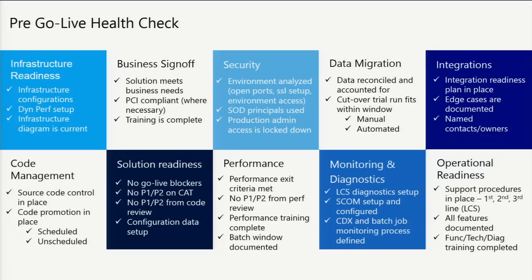And then you also have a way of saying, okay, from the users, can you live with this for the next week? Because that's when we have the next drop. You're able to set expectations clearly about what's going to happen, and it makes it much easier to manage. Are there emergency situations? Of course there are. You've got some things that could be production down or almost that critical. Do you have a process in place for that? So again, one of the critical things we need to see is that you're ready to go live by having these things in place.